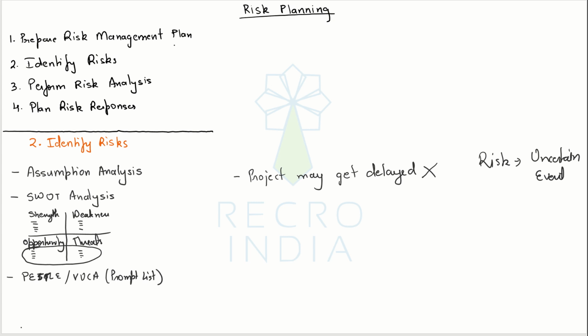So, as a recommendation, you should always try to make your risk descriptions more informative, clearer, and more self-explanatory. How to do that? Try to describe your risks as a three-part statement: what is the trigger, the event, and the impact? When you follow this structure, you will see that risk descriptions become so much better.